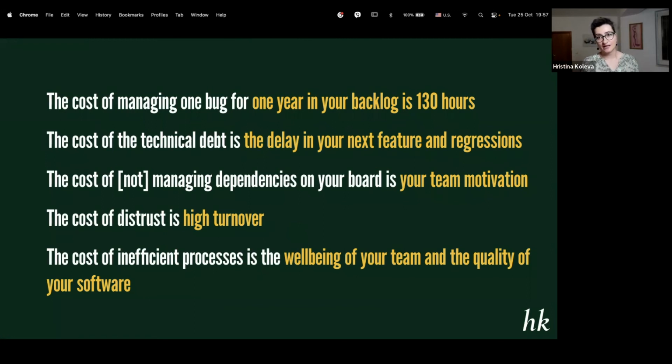So any dependency, any blockers, anything that really stopped the work must have not just high priority, it should be resolved immediately. And that, of course, is a company culture, but we as a team need to request and demand it, because otherwise the entire software delivery is slowed down.